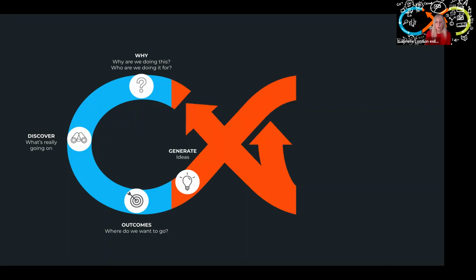Then when we get into what we call the options pivot, this is where we generate our ideas. So we say, okay, based on the problems we're seeing and the data and the outcomes we want to improve upon, here are the ideas. These are what I call options rather than the traditional requirements. When you say requirements, people think, oh, they're required, we must build them. I like to say, well, it's a giant list of guesses. These are things we think might help us achieve the outcomes, but until we validate and test them, we don't know. So the way that we do that is we refine them into something more tangible that we can do the least amount to test out an idea.